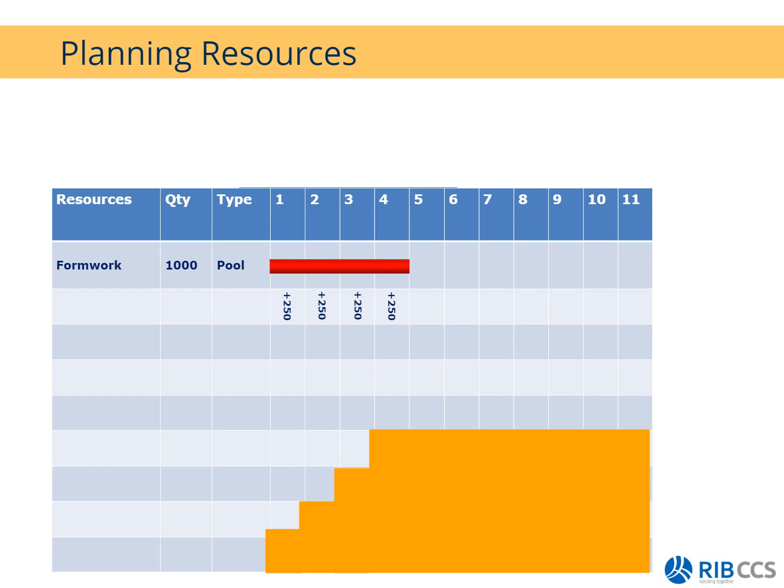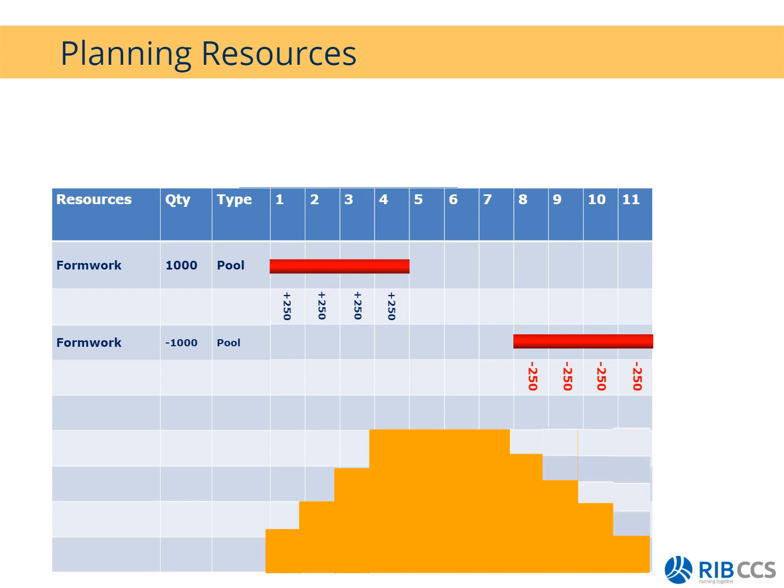A good example is you set up your rebar, you put up your formwork, you cast your concrete, and then after curing, you strip your concrete. Then you can introduce another activity, call it stripping of formwork. You will allocate a negative quantity next to that specific activity, and depending on the duration, you will remove it accordingly.